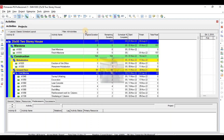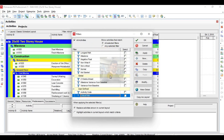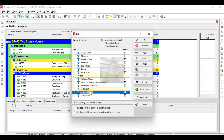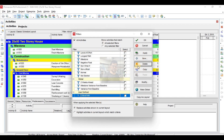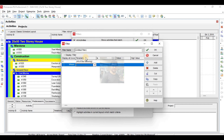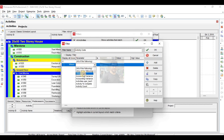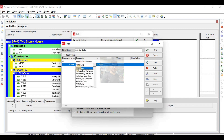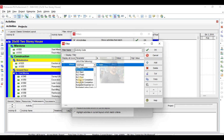Now my client asked me to send him only the schedule including civil activities. I will go to Filters from here. This activity code filter I have already defined. If you want to see how to define a filter, click New Filter and name this filter 'Activity Code.' Now make the coding for this filter — one zero zero field. I've done this numbering, one zero zero, because if I don't add this numbering it will appear somewhere down here and be hard to find.